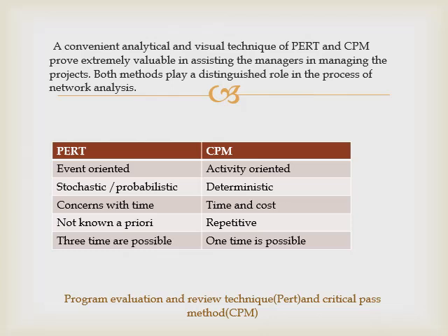We will show the difference between activity and event. CPM is used for projects involving activities of a repetitive nature. One time in CPM is possible.